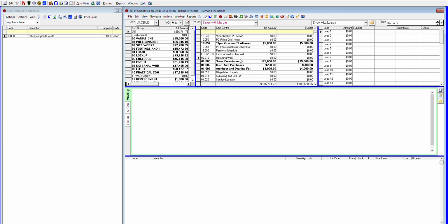And the latest version would be the weekly or whatever name the latest. Yeah, that's not necessarily the job that you would copy across. We'd have a conversation, say, well, what did they accept? We might have given them some cost savings and priced it in version 3, and they said, look, actually we've spoken to the bank, we think we can do everything, so we're just going to stick with version 2. So you would just check in the contract and review what had been put in that bill of quantities when you transfer the job across.